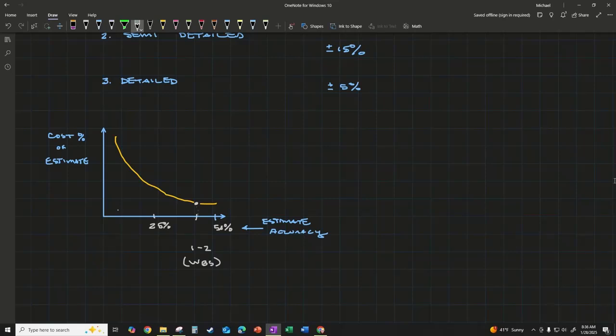And when you're in the more detailed portions, the costs are much less of a percentage of the cost of your project. But as you get more detailed here towards the 3 to 5 or 3 to 4 level of your WBS, you want more accurate cost estimates, and it's going to take longer to produce those and cost you more to get people to actually produce those too.